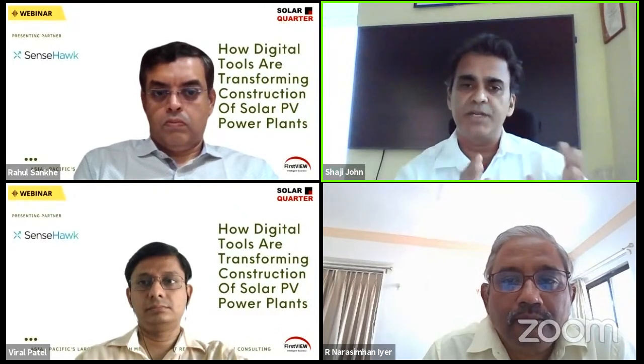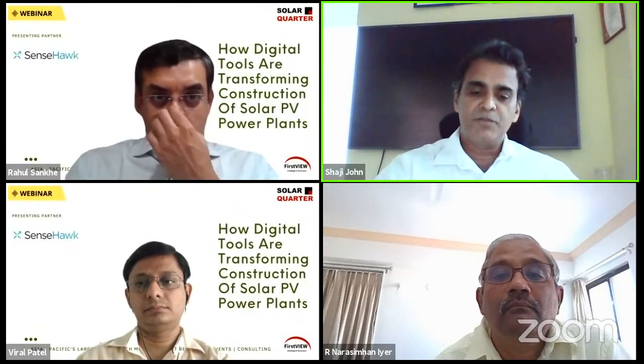Basically, it is to digitalize the way of monitoring the progress from the baseline construction schedule, and how the actual construction is happening. Today, it is more or less fed by the engineers putting the progress into the apps, and then the management or anybody can see it and take corrective action to control the project. But maybe Sensoc has understood a better technology to see from the drones how to capture the progress and get it into direct monitoring. So maybe that is something we have to further improve in our system. So that is the first thing.